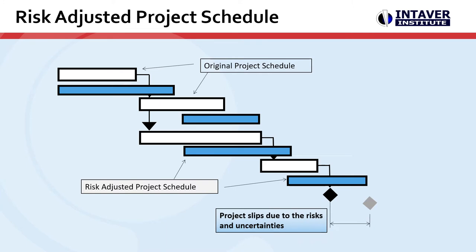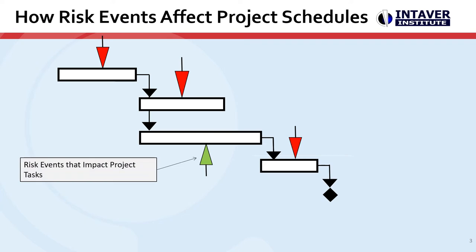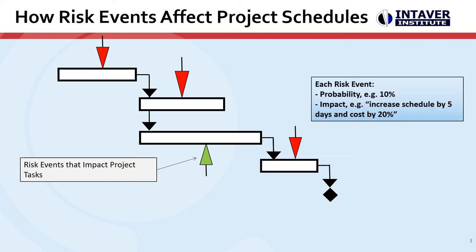Now let's take a look at how we can assign risk to a project schedule. Risk events can be assigned to your project schedule. The arrows represent risk events that have been assigned to activities and can be threats or opportunities. Risk event assignment includes probability and impact. For example, if a risk occurs with a 10% probability, it could cause a delay of 5 days and a cost increase.